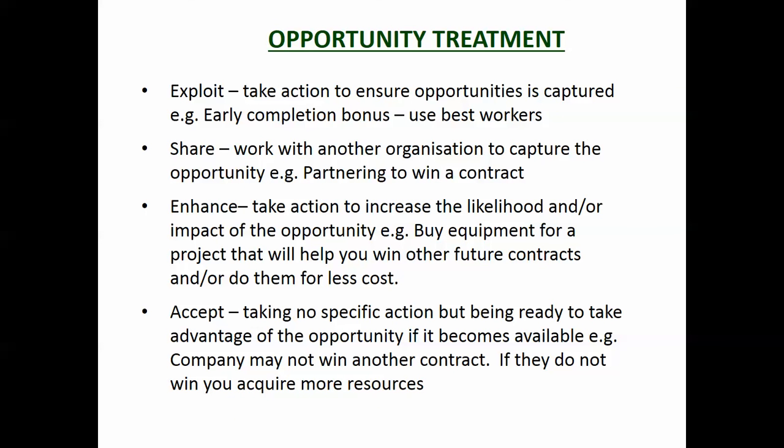And lastly, just looking at opportunities, exploit it. So you take the action to ensure that opportunities are captured. So early completion bonus. They might say, if you finish early, we're going to pay you extra money. So you use your best workers and you resource it all up. You share it, working with another organisation so you've got a better chance of, say, winning a contract. You enhance it to increase the likelihood of it. So you buy equipment that will help you win that contract, or you accept it. You just don't take any specific action. If it happens, that's really great, but you're not doing anything special to try to make it happen.